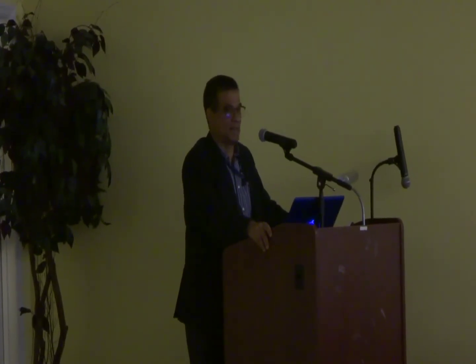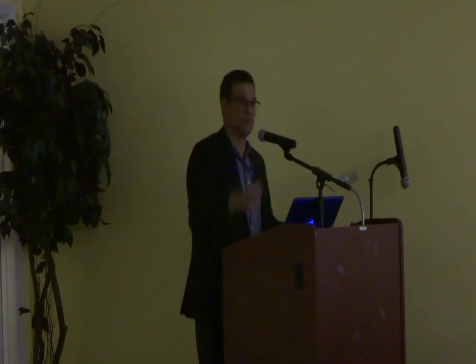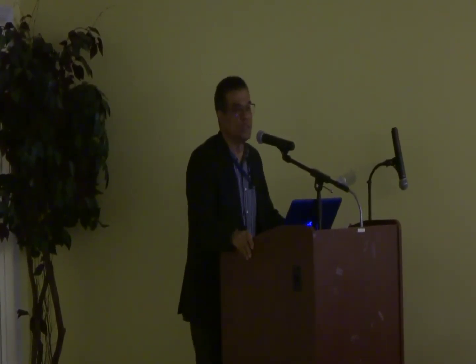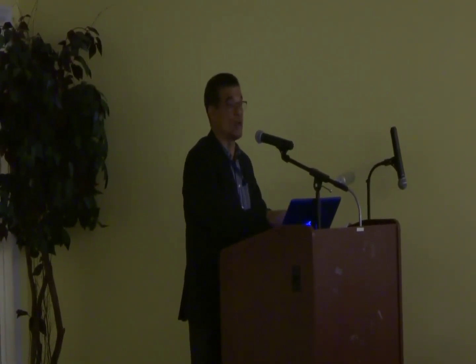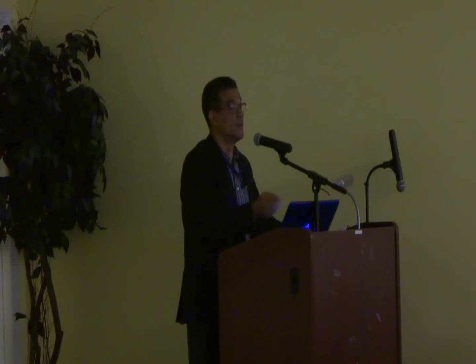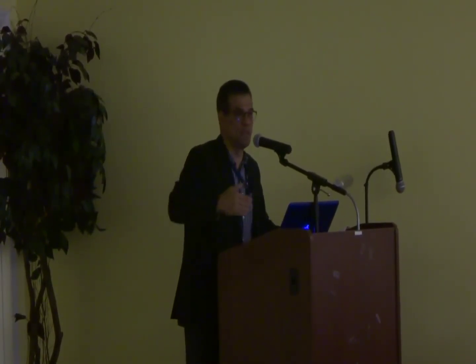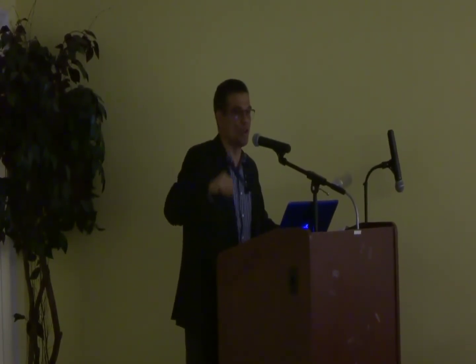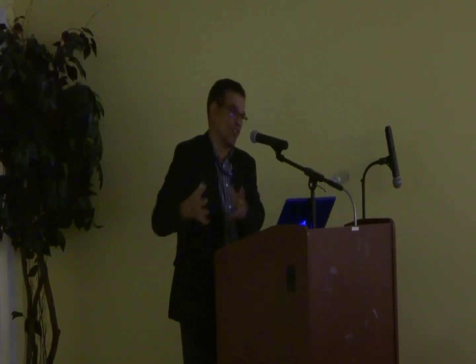If you write him a letter and say, I accept your offer, what do you have? A contract. You have a contract. So you can form the contract in two ways. You can form the contract by writing him a letter and saying, I accept your offer. That's called a letter of acceptance. Or you can sign the contract, you can execute the contract. So you have a signed contract document, which in effect is the contract.